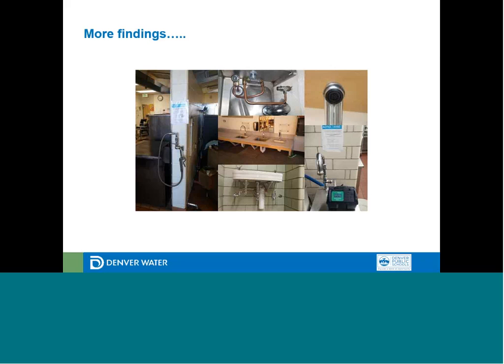In the center of the group of images, we have 2 hand washing sinks and a little bottle fill station, and in this room, there are likely 3 more sinks on another wall. And so when you're estimating sample counts, we drastically underestimated. Once we started getting out there and looking into things, you think about if I was a kid brushing my teeth, if I could use any of these things, it ramped up pretty quickly.